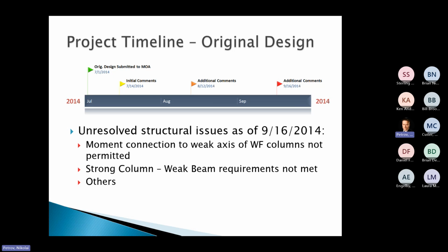All right. So the original design was submitted to MOA in July of 2014, July 1st. Initial comments came back on the 14th, a 2-week turnaround. That's good. Then almost an entire month went by until August 12th when additional comments came out. And before any responses came in, a month later on September 16th, additional comments came out.